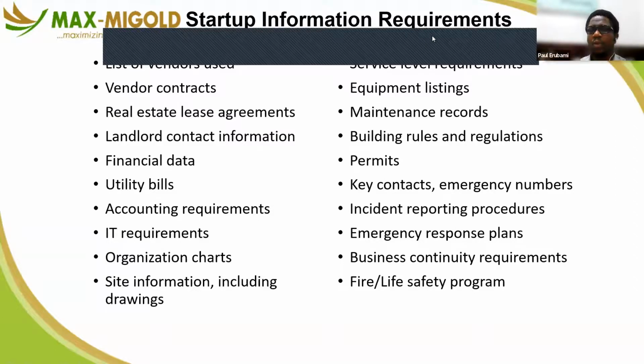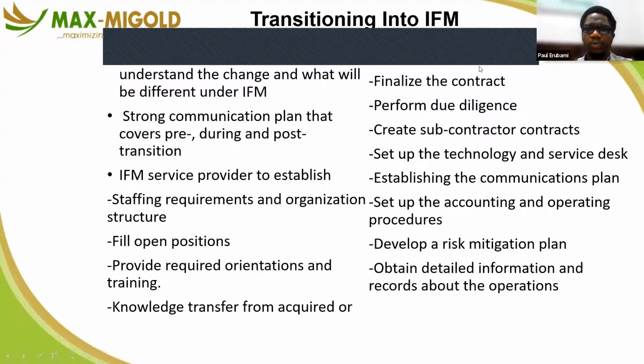So even when you are looking at the lowest bidder, it's either someone who has mentally discounted all of your problems and wants to get in and refer them back to you when you are stuck or choked, or someone whose prices are so high that no matter what happens, they'll be able to deliver, worst case scenario being to replace a certain equipment or asset for you. And that's what you don't want.